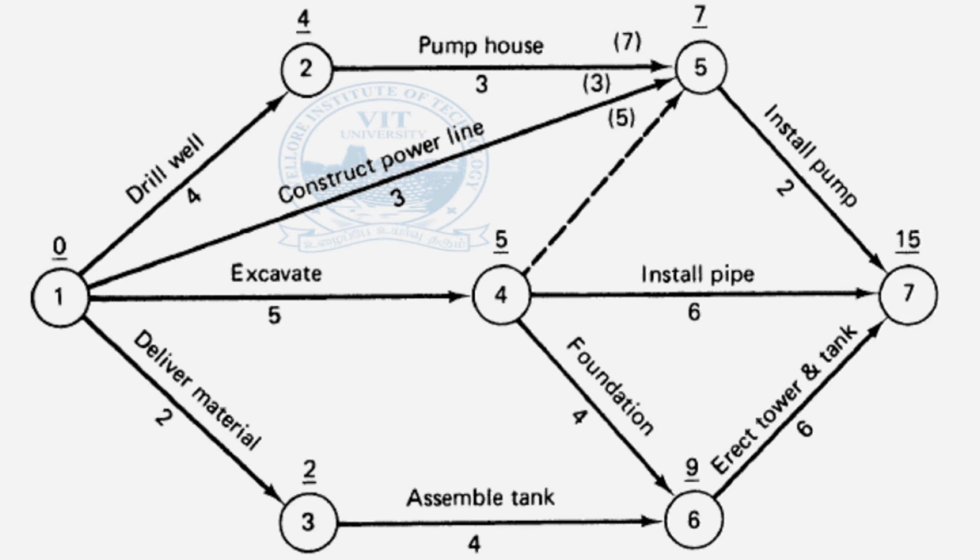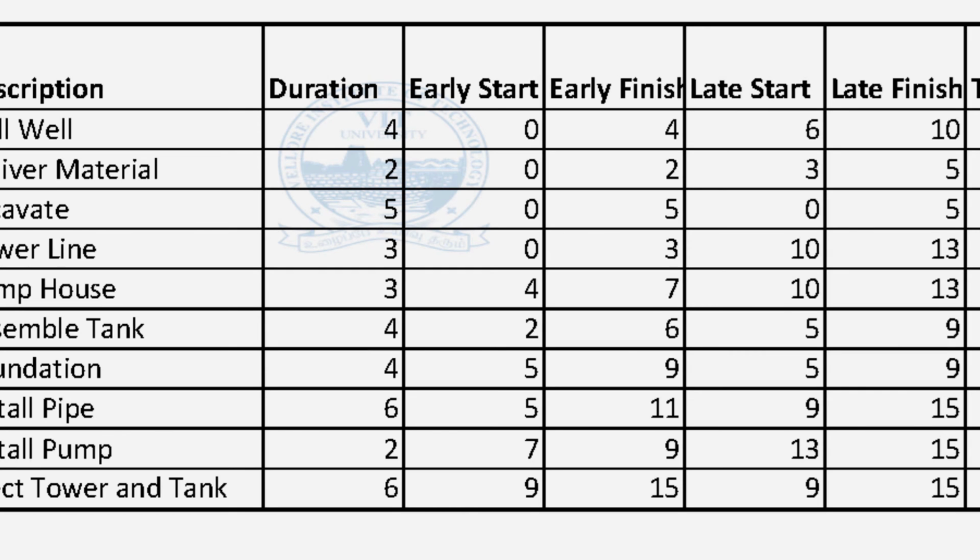We will just try to do one or two loops. So this 15 minus 2 is going to come to 7, because there is no other way I can start it. Now that I have this as 7, look at the precedence for the others. 15 minus 6 is going to be 9. So this is 9, and the other loop you can come by this one. 15 minus 6, again this is 9. So you will keep back working on each of these nodes. Once you do it, see whether you are getting this result on the backward pass.